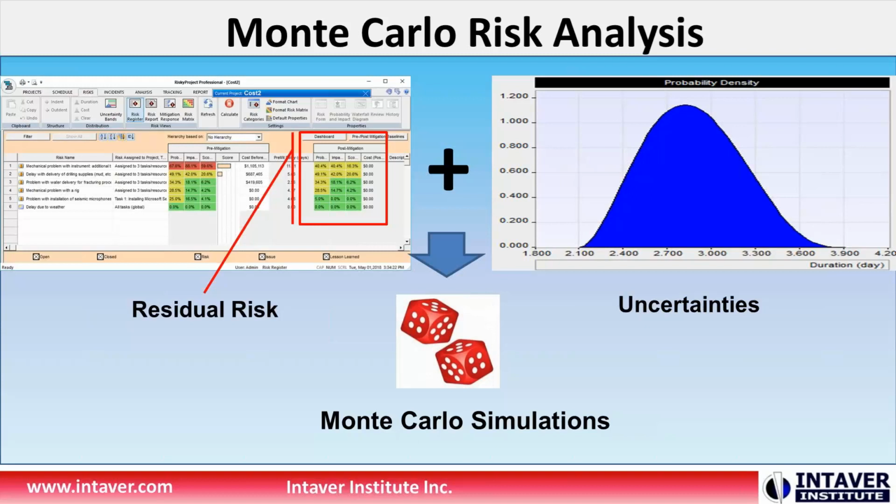And the point of that is that we're going to develop some risk-appropriate, or risk-informed, schedule margin and cost contingency. And we call that a risk-adjusted project plan, but it's also realistic because it takes into account the level of risk. So you get one that I call the Goldilocks, not too little and not too much margin or contingency, and it should get it just right if you use the right sort of what we call certainty levels.